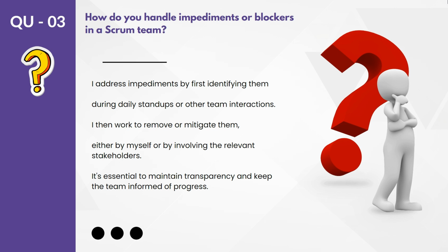First, because it might have dependencies, and second, because in a Scrum framework we ensure transparency. It should be clearly visible to everyone that there is an impediment and what it is. When you are using Jira, you can flag the issue, and while flagging you can add a comment. That will be a good enough process to follow when you have to highlight an impediment.